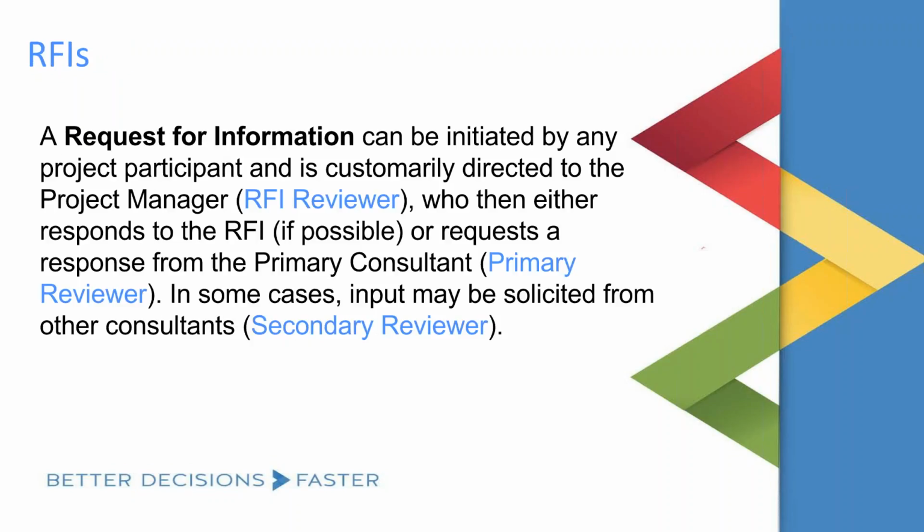So that we are all on the same page, I want to just discuss what an RFI is. An RFI stands for Request for Information, and it can be initiated by anyone on the project. Typically it is directed to the project manager, the RFI reviewer, so introducing some new Gate 3 terminology. In the system we will be configuring an RFI reviewer. And then this person will review the RFI.